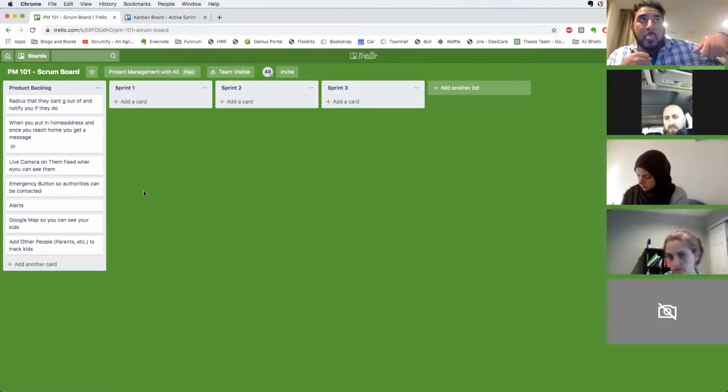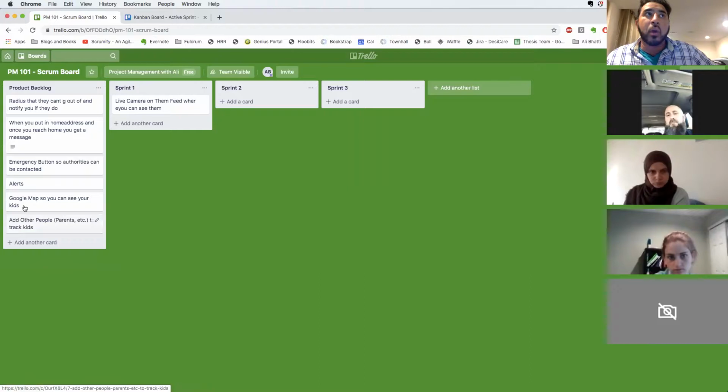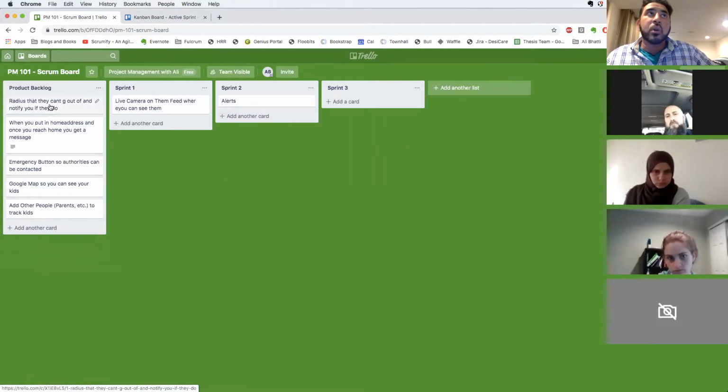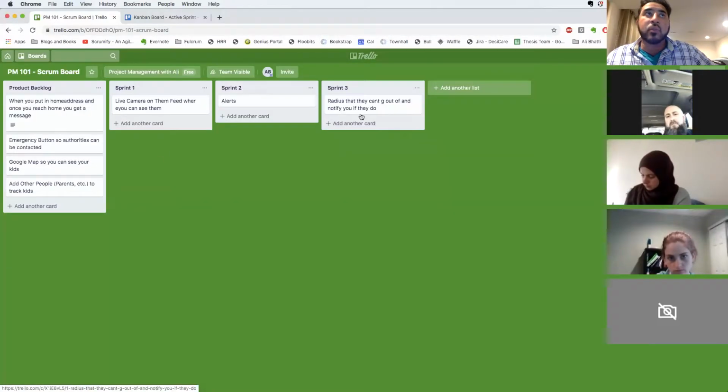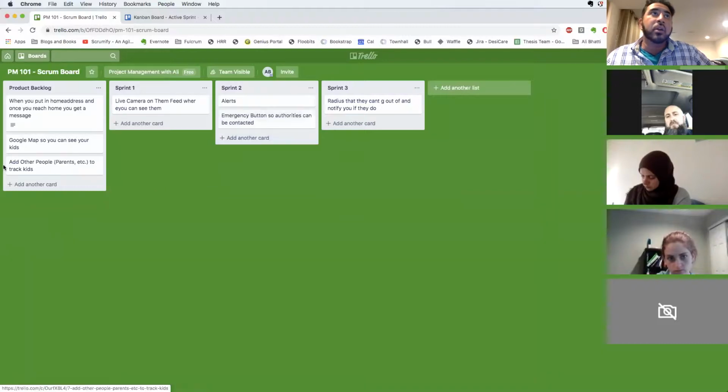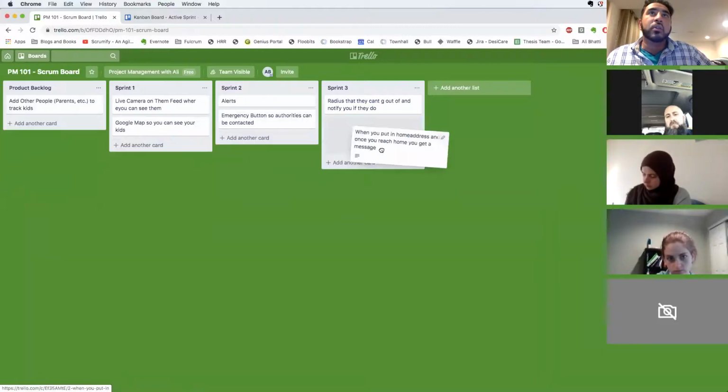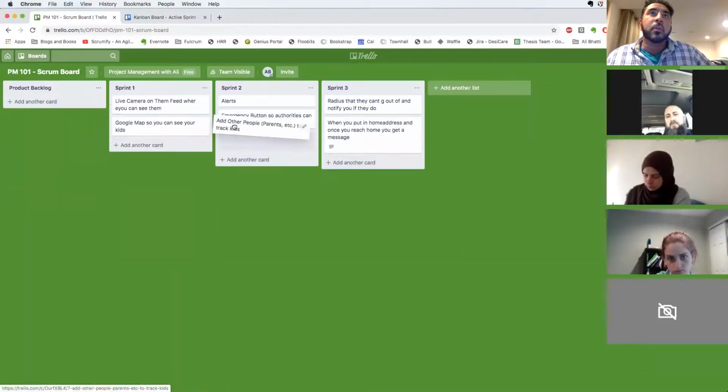Based on that, you'd have the third meeting, which is sprint planning, where you decide what goes where. The product owner will say, okay, I want to do this one in sprint 1, this one in sprint 2, this one in sprint 3, this one here, and this one here.